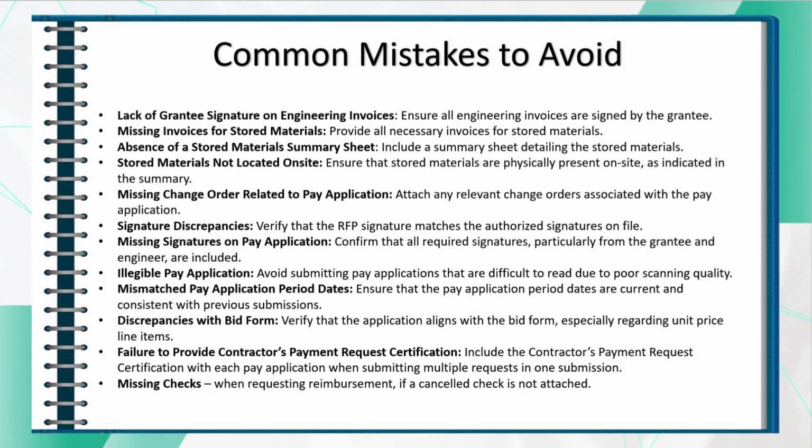Another frequent issue is missing invoices for stored materials. All required invoices should be included to correlate to all listed materials and substantiate the request. Additionally, ensure that a detailed stored materials summary sheet accompanies the submission, as it provides crucial details about the materials. In addition, another important consideration is that stored materials must be located on site, as detailed in the summary sheet. This verification is key to ensuring compliance.